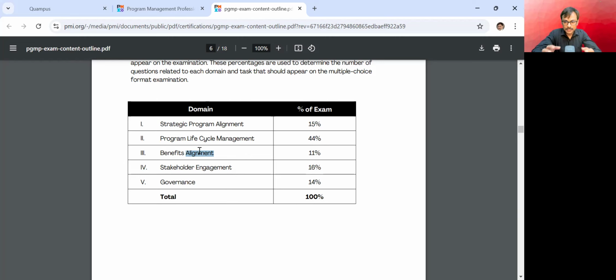In program management, the focus moves from requirements to benefits. What kind of cost advantage, what kind of customer satisfaction advantage, what kind of service benefits the organization wanted to get from this program, and have you achieved those benefits? Have you reduced the time it takes to process a request? Have you reduced the overall inefficiency which we had in our organization?